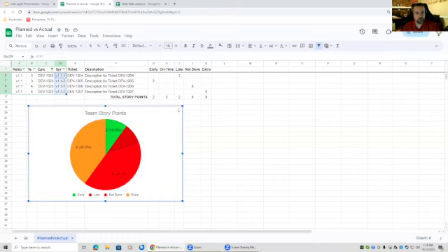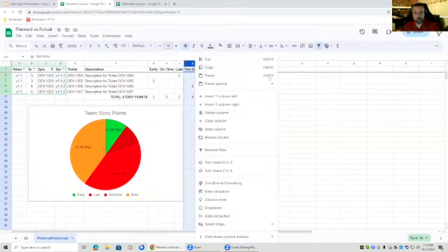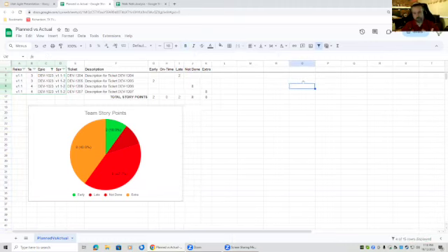You can change what filters that you use. You can change how you group your tickets. So even if you had a team that wasn't doing, planning multiple sprints at a time, they were just planning one sprint at a time, you can still punch that data in here on a sprint by sprint basis and say, here's what you did early. And if there's stories that are late that were supposed to be done in sprint 1, and you make this a cumulative spreadsheet. You don't just create a new spreadsheet for each sprint. You just keep adding one sprint after another after another. Then you can start looking at how many tickets has the team been delivering late?